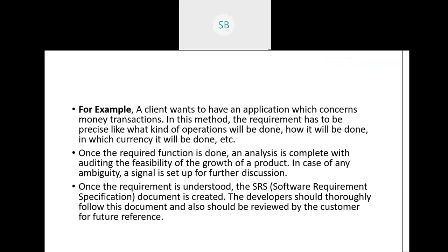Now that software requirement specification is given back to the client. The client sees, okay, these are the features I will be getting in my product. If satisfied, they say okay. Otherwise he will say, no, I want something more. Then the senior level managers work on it and again give the SRS. Finally, when they are satisfied, they give the documentation to the designer team.